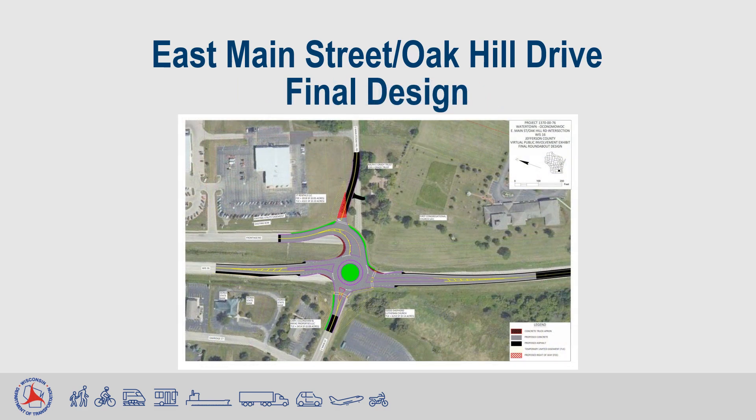As you can see on this slide, the east leg of the roundabout has been reconfigured to direct traffic onto the Frontage Road, and Oak Hill Road has been reconfigured to a new intersection just to the north of the current alignment. Along with this configuration of the roundabout, a concrete truck apron was added to the northeast quadrant of the roundabout to accommodate trucks making a right turn from the Frontage Road onto Westbound Wisconsin 16. The existing sidewalk on the Frontage Road will be extended along the Frontage Road leg of the roundabout to the southeast quadrant, where a crosswalk will be included across the south leg of the roundabout.